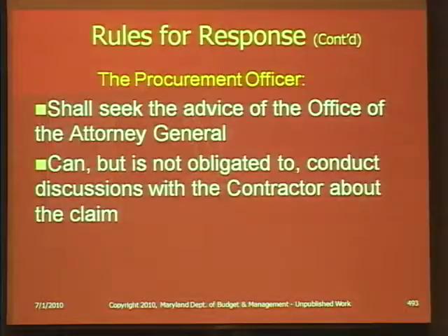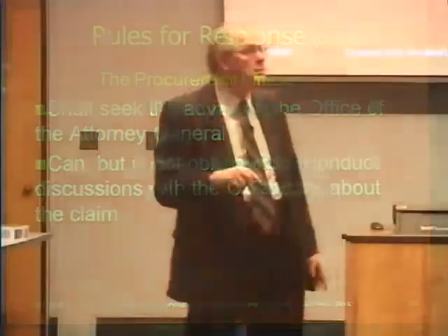You shall seek, shall. Very good. Not will, not may. Shall seek the advice of the Office of the Attorney General, because the Office of the Attorney General has to approve the answer to any claim, just as they have to approve the answer to any protest.